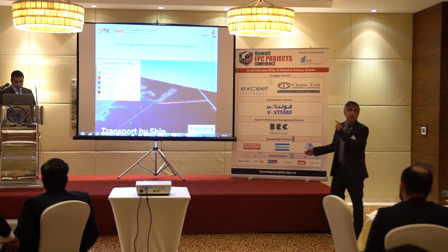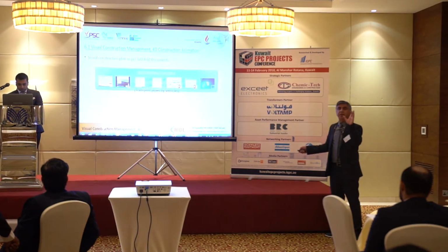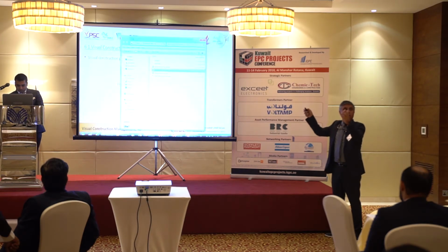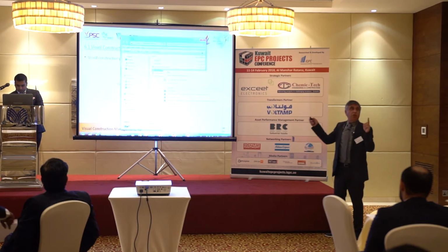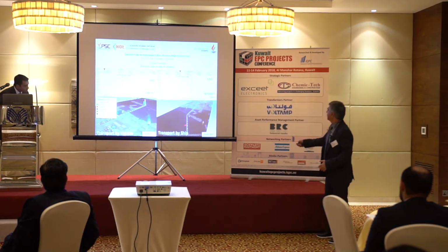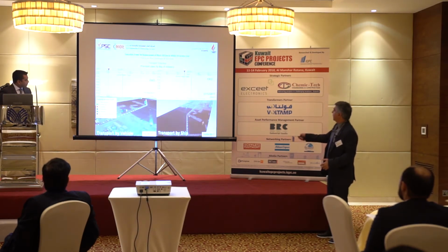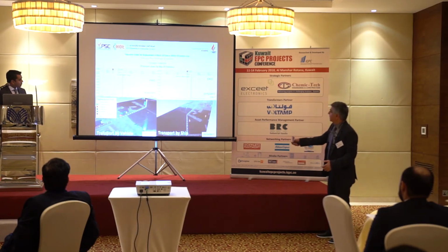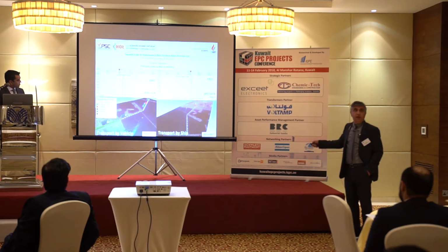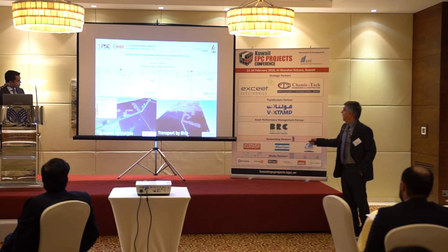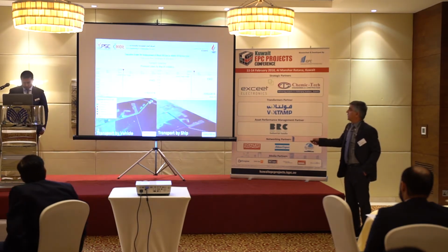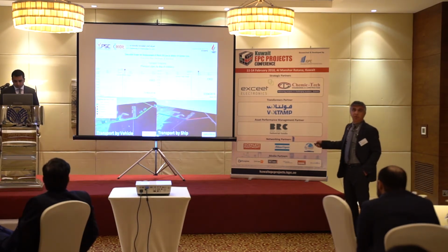Now, in the last video, I will show you a quantitative comparison between the two models in the Gantt charts, where you can see the impact on cost and time for both models. Here you see the Gantt chart if we use the tugboats, and this is the model if we use the cars. The difference in time and cost is very high. The time here is almost double the time there, and the cost here is less by almost 1 million KD.